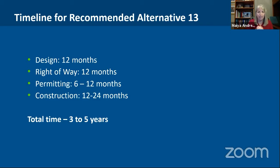Now, you will have people who are willing to provide their property because they want this project and they're getting flooding and they want it to move forward. It's very unusual, and I've done a lot of projects with a lot of right-of-way acquisition, for you to get willingness by everyone, especially when probably 3/4 of those 40 people, only about a dozen are really experiencing this problem. Most of those others aren't. And so they don't have to willingly sell us their property or sell us rights to their property or allow us right down the middle of their property.